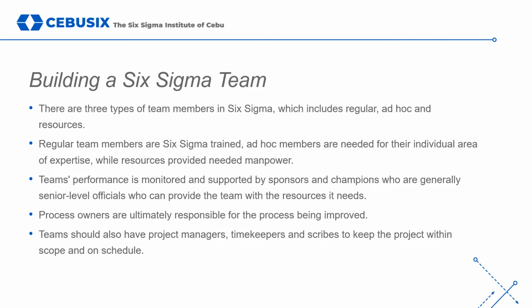Not all team members will serve consistently throughout the entire life of a project either. This is often why companies send existing employees for Six Sigma training rather than hire Six Sigma experts. Executive leadership groups working with Six Sigma leaders and experts usually put teams together. Any process improvement team should have, at a minimum, a Six Sigma leader, a process owner, an expert on the process, and someone to manage budgeting and accounting. Some of those roles might be handled by the same person.